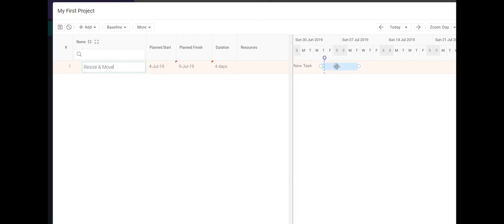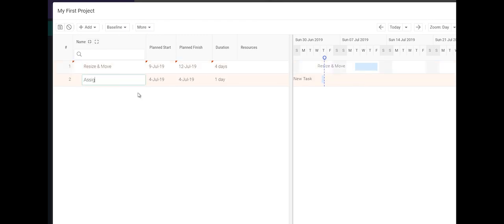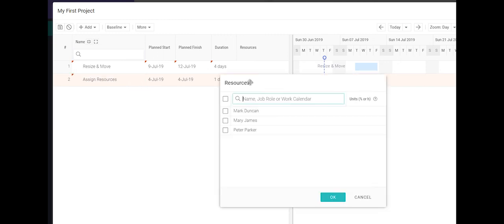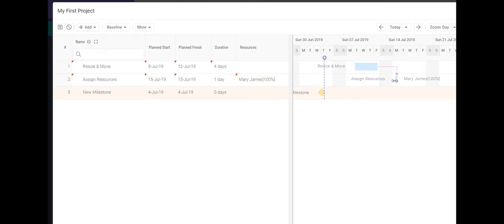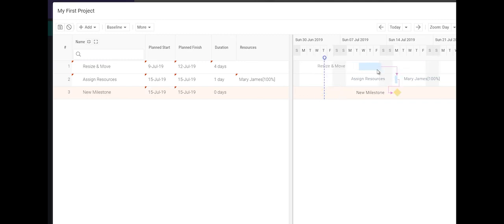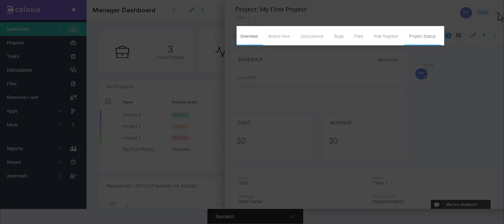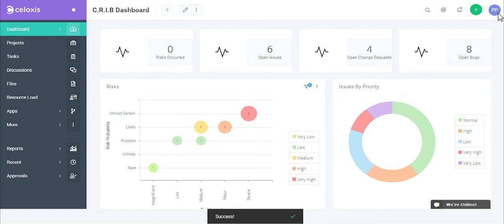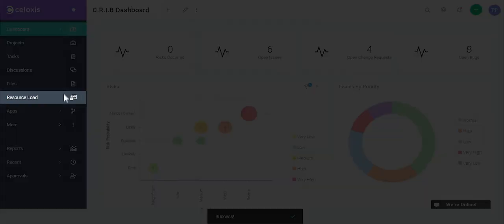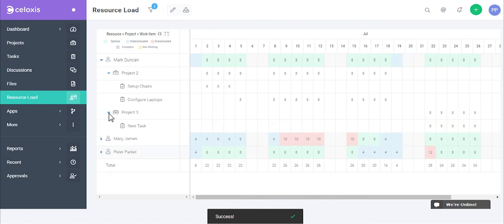With our interactive Gantt, you can easily resize and move tasks, assign resources, add milestones, drag dependencies, and even push them out. You can quickly change your project views to see related discussions, bugs, or risks. Again, these are reports that you can create. To see the daily workload of your resources, you can access the resource load chart from the menu. You can easily identify and fix over-allocations from here.